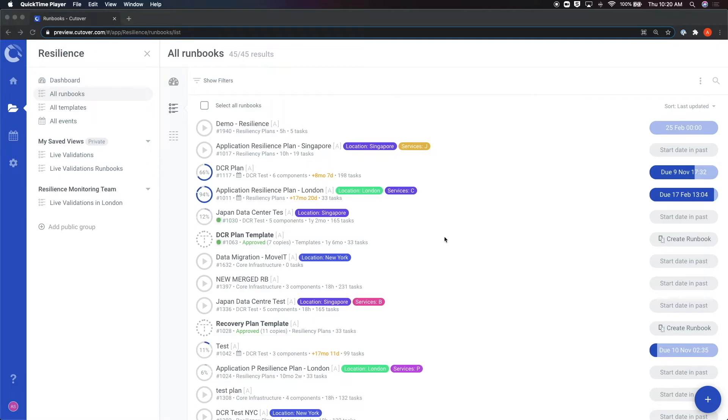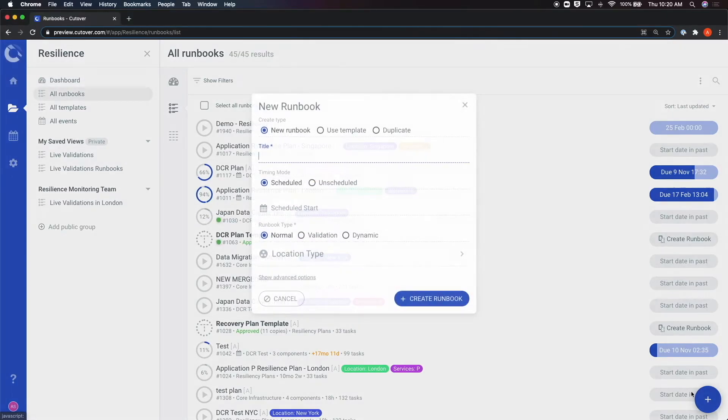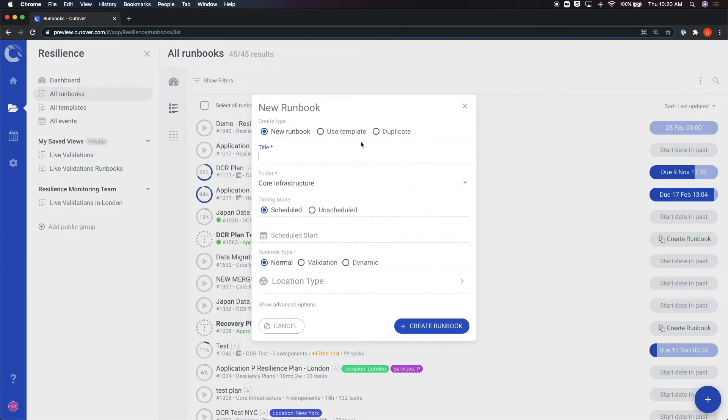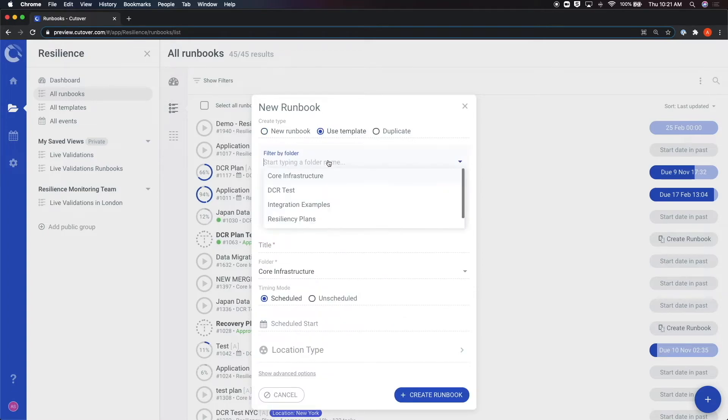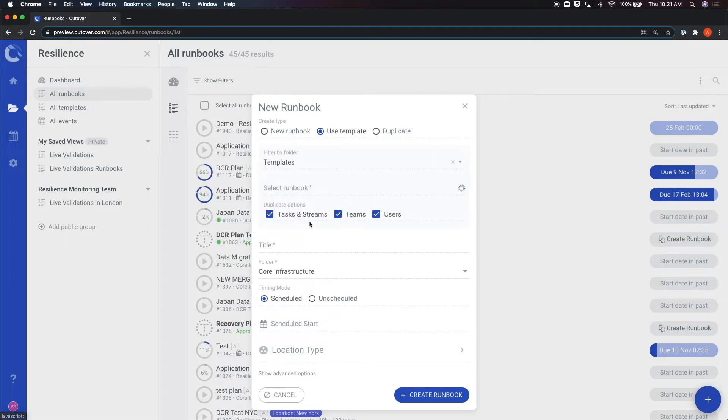To create a runbook from a template, you must click on the blue plus icon on the bottom right of the screen. This will open up the configuration box where you can begin to configure your runbook. Instead of clicking on new, let's click on use template. This will add a drop-down with the folders allowing you to choose from the templates already created.